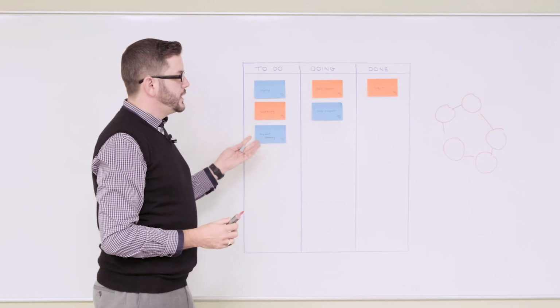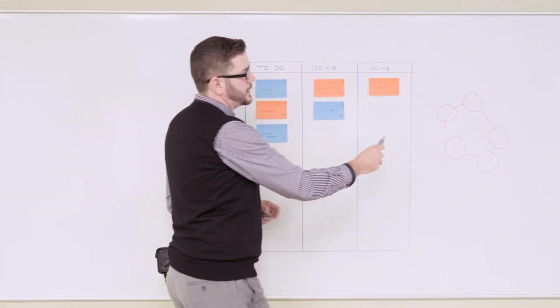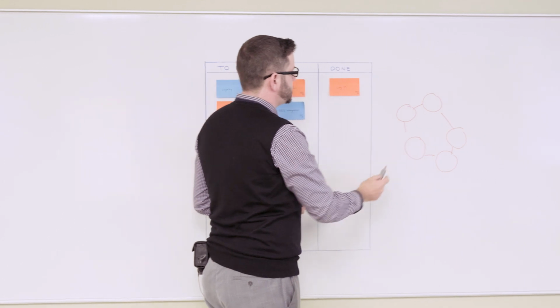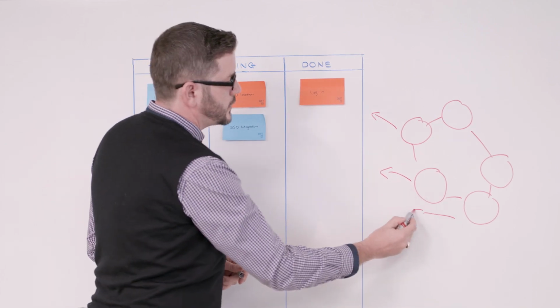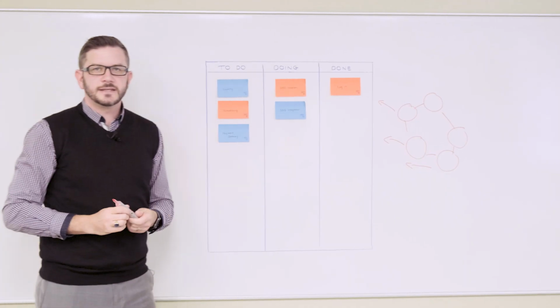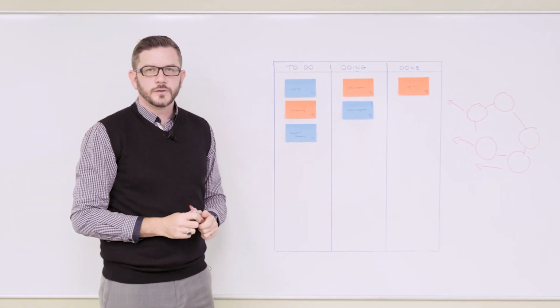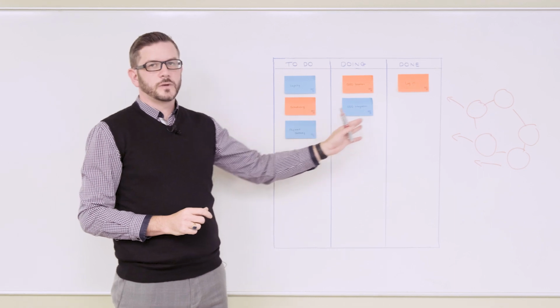In the second format, when you're walking the wall, instead of the team members having a conversation, each team member talks to their item on the Kanban board and tells us what they are doing today in order to get that story to done.